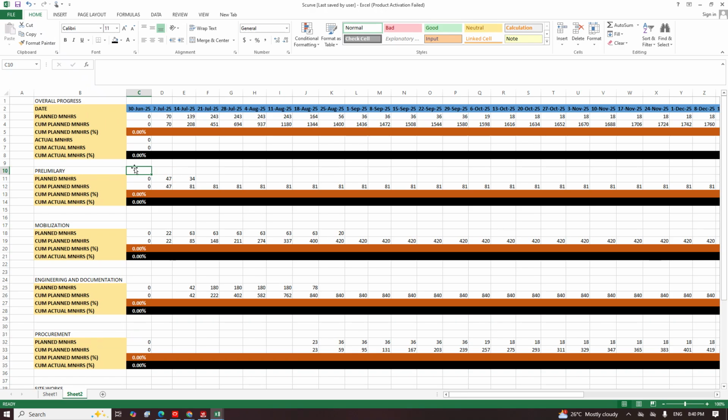Okay. Now one of the formula we are going to put is this. I will convert this particular one. We have the cumulative here. We have the budgeted unit here. So what I will do here is to divide the budgeted labor, the cumulative by the total budgeted labor unit. That's just what I will do. And I activate percentage already. Remember this percentage has been activated. So it will now convert it to percent for me.